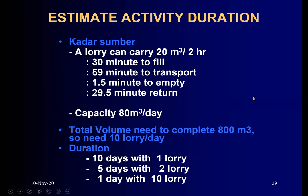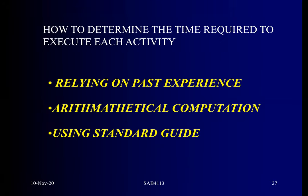Last week I was explaining this concept. The first step in scheduling is to identify the project — when you enter a tender, you already know what kind of project it is. The second step is to develop WBS, which we'll talk about in the next slide. The following step is calculating activity duration.